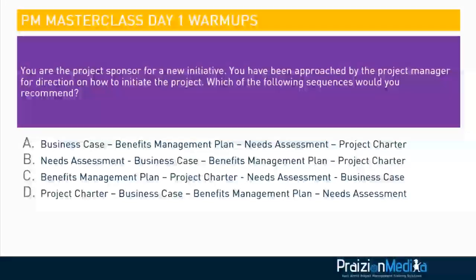The project charter should not be the first thing. That disqualifies option D. The benefits management plan should not be the first thing. That disqualifies option C. Option A says business case and benefits management plan before needs assessment. That is wrong. The correct answer is B. The needs assessment is first, then the business case.